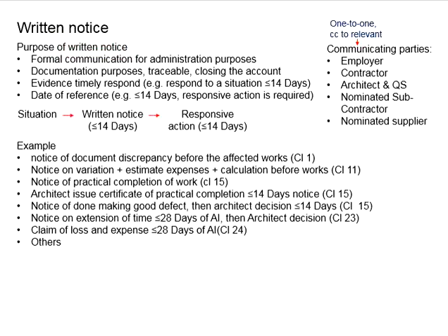If you realize the purpose behind this written notice, you will find it very important, especially when you have limits in terms of the durations. For example, under certain situations, some written notice shall be given within the stipulated time. If this is not given, it is deemed that you are not interested, or it is deemed that you forgo your entitlement, and so on. This might not be in your favor. Since it is just a written notice, you might as well just provide it.